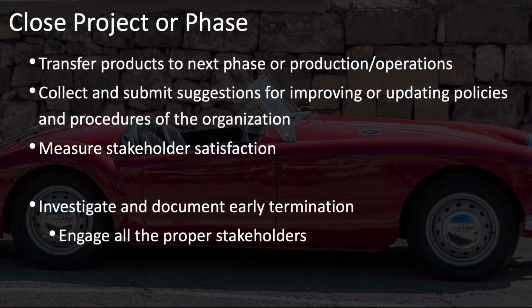In closing your project or phase, you'll want to make sure that you transfer the products or results to the next phase of your project or to your operations or production environment. This is often overlooked or underappreciated. You should make sure that you spend the appropriate amount of time in planning for a smooth transition, including meeting with production or operations managers to understand what their needs are in order to be able to take over responsibility for what your project has produced.